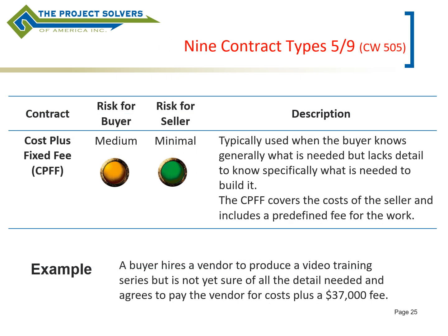So now we're going to be discussing the cost reimbursable contracts, and this is where the risk shifts from the seller to the buyer, because the buyer doesn't know necessarily up front what the full value of the contract is going to be until they get closer to the end of the contract, although you can always put a ceiling price in. It does make it riskier.